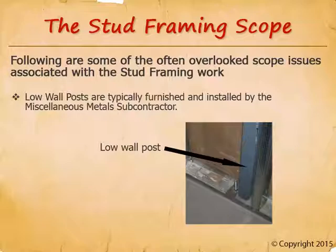Here's the best solution for hard bid projects: when you see a low wall that needs a steel post but it's not shown on the drawings, send a pre-bid RFI to the architect asking if low wall posts are necessary for those freestanding walls. The architect will respond and send that response to every other bidder, ensuring all competitors include these items. This levels the playing field, and architects appreciate it because they don't like change orders either.